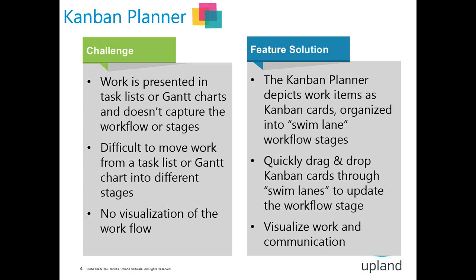Regarding work planners, the most significant change was the introduction of a new work planner, the Kanban. Kanban is Japanese for billboard and provides a simple way to visualize the progression of work. Looking at the challenges here, before the Spring 2014 release, EPM Live presented work either in task lists or Gantt charts. Clearly this didn't capture the workflow or stage of the item in question, and offered no visualization.